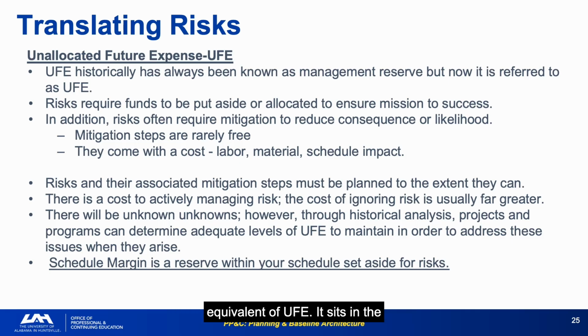Schedule margin is the temporal equivalent of UFE. It sits in the schedule as a buffer between the working estimate and the commitment date. Both must be sized based on actual risk analysis, not formulas or rules of thumb. There will be unknown unknowns. UFE is not just for identified risks. It is for the events you didn't anticipate. Historical analysis of similar programs gives you the best basis for sizing it.